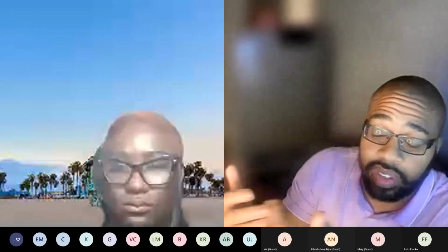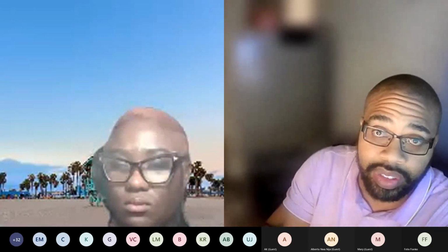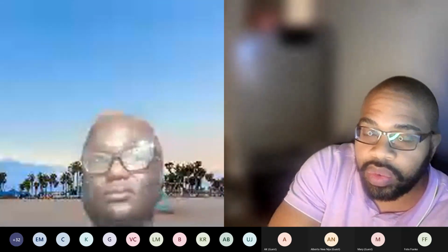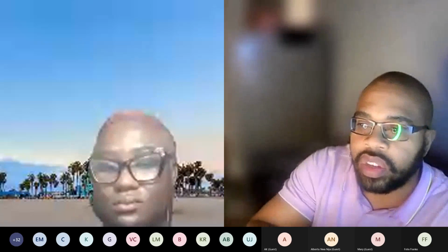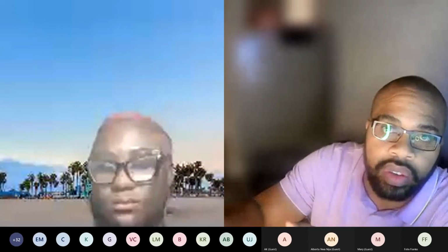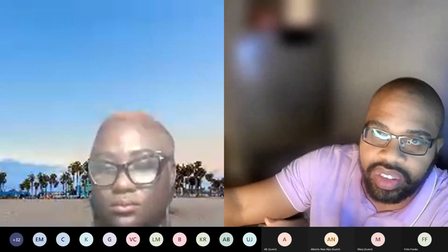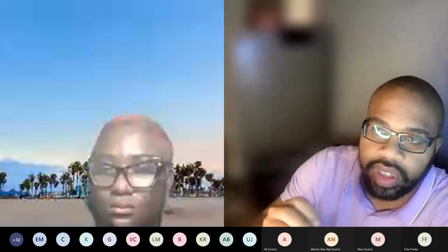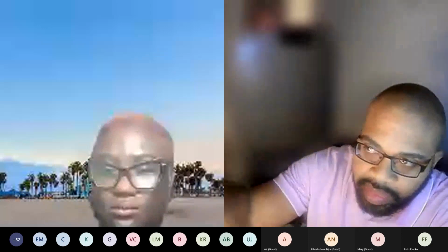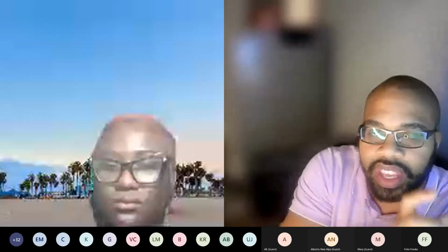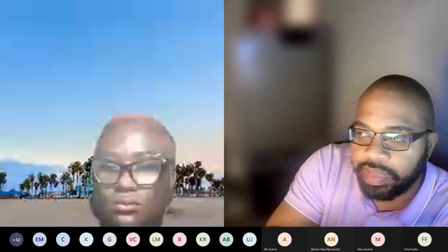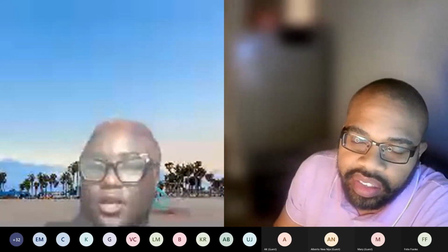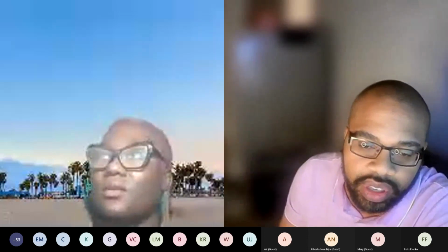And a risk is just a label. A risk is a label that you attribute to a story. So the story is at risk if there's a risk of not completing in a sprint. So you just put risk, but a risk can't be, it's a label. You label a story that is at risk. So that's how those work out.